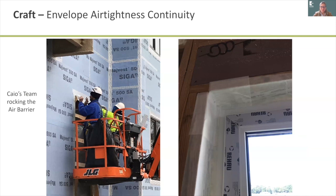The other thing I would say, and I was on the accelerator a couple of years back, and I definitely used a few of these slides, but it's still critically important. When we first were trying to get our builders up to speed on Passive House, and at this moment, every Passive House project we've built has been a different builder who'd never done it before, there's a learning curve. At first we were like, this is a Passive House, everybody, no holes in the building, don't do anything. And it was our own anxiety that led us to go down that path. We were finding that builders were pricing things with crazy numbers because we were putting the fear of God into them and they didn't know what they were getting into. And it was not good.